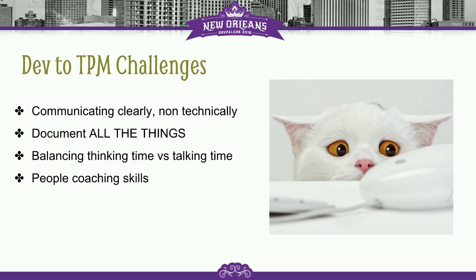One of the tricky things as you become a project manager from being a dev is that you're going to spend a lot of time on the phone, and clients will accidentally, and maybe not intentionally, twist things around. So one of the most skillful things you can do is, once you get off the phone, send a reverse confirmation email. Like, based on our understanding of our conversation, we are going to action this by this timeline, and you're responsible for getting me content by that date. You don't even have to ask for their confirmation. You can say, this is a confirmation of the conversation we had. And if they don't think it's right, they're going to reply right away and say, no, you said Tuesday, not Monday.